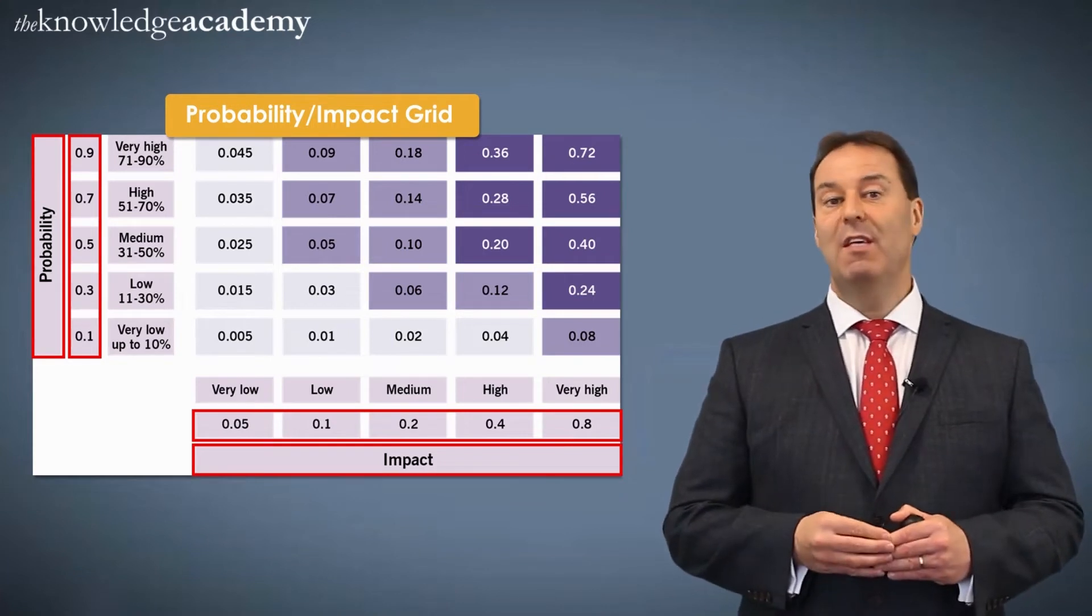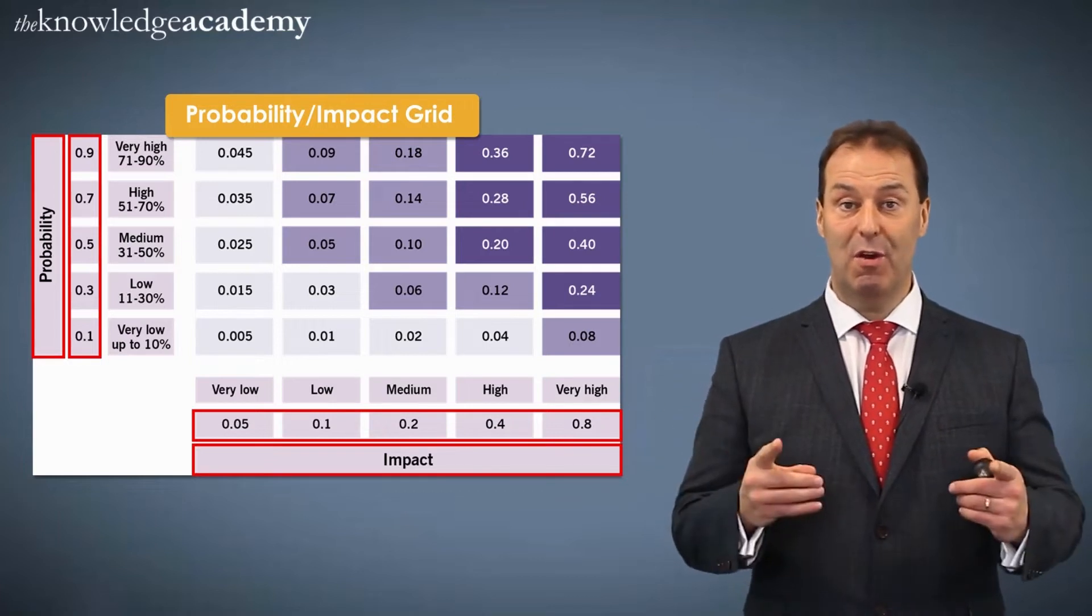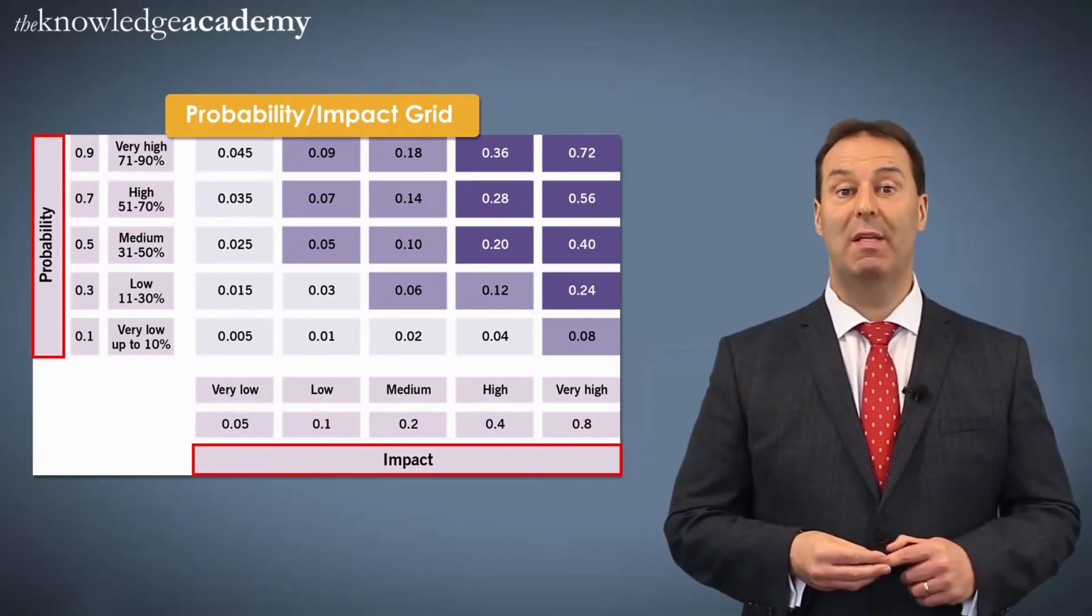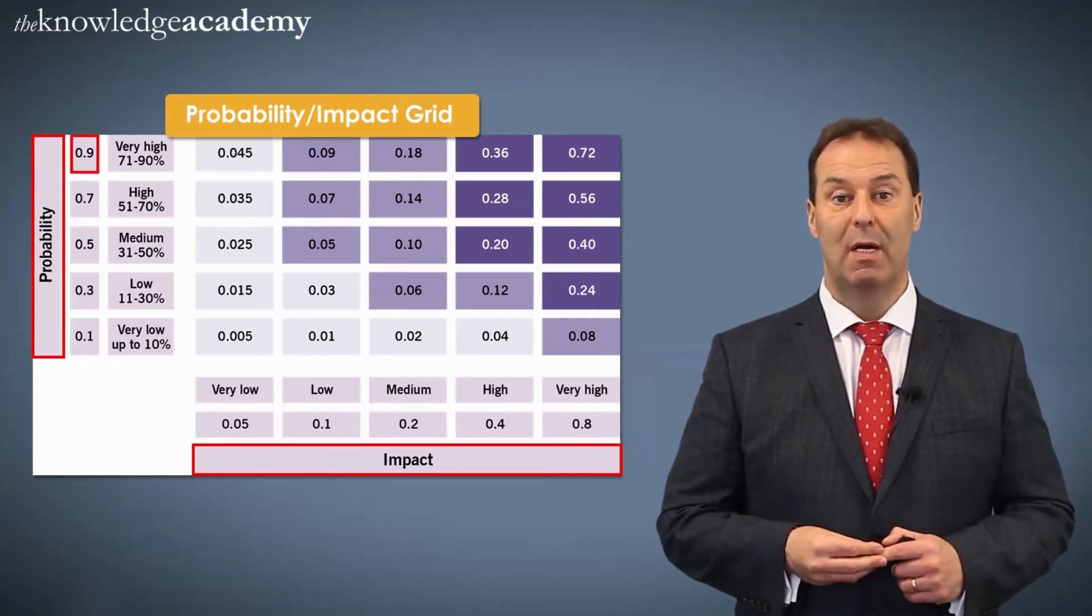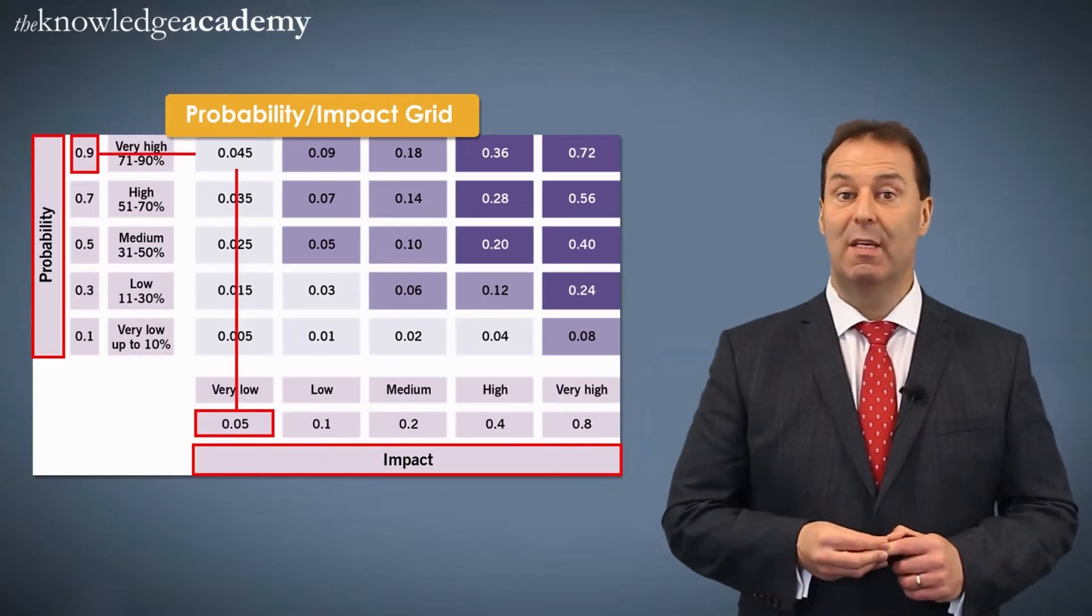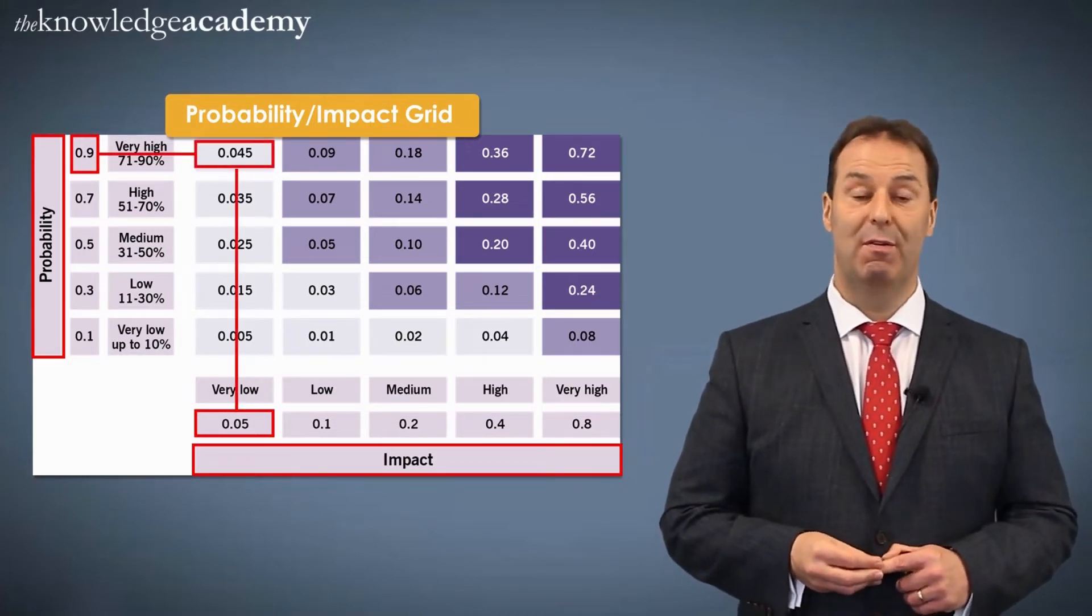When you take these two values, one from probability and one from impact, and where they cross over, you multiply them. So for example, if you were to take the probability value of 0.9 and the impact value of 0.05, where the two meet in that grid, you get a ranking value of 0.045.